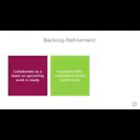Backlog refinement is an opportunity for the entire Scrum team to collaborate on the work that they will be tackling in the next sprint, so the development team can be as efficient as possible when they begin that work. The Scrum framework recommends that the development team should be prepared to invest about 10% of their total time into refining the upcoming product backlog within a sprint, which in a 2-week sprint equates to about 6 to 8 hours per individual.